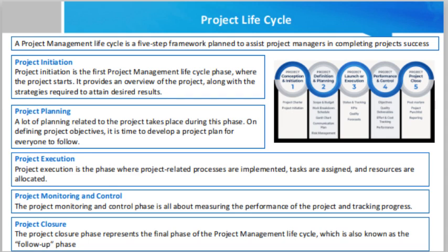The project plan developed should include all the essential details related to the project goals and objectives, and should also detail how to achieve them. It is the most complex phase in which project managers take care of operational requirements, design limitations and functional requirements. The project planning phase includes creating a project plan. A project plan is a blueprint of the entire project. A well designed project plan should determine the list of activities, the time frame, dependencies, constraints involved and potential risks.